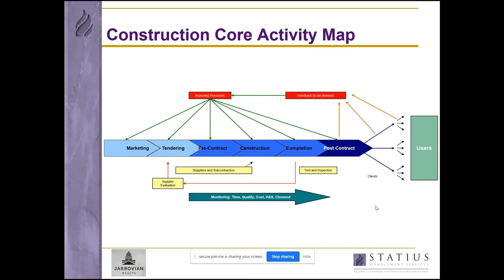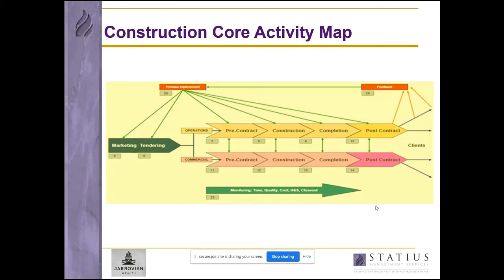Supporting these core processes are some critical support processes: the first yellow box is supplier and subcontractor evaluation; the long thin yellow box is managing suppliers and subcontractors; and the final yellow box relates to additional test and inspection activities. The green arrow is the ongoing monitoring of time, cost, health and safety, and close-out. As an example of things changing, a decision was made to split the processes after tendering activities in order to separate project management activities from the commercial and financial activities.